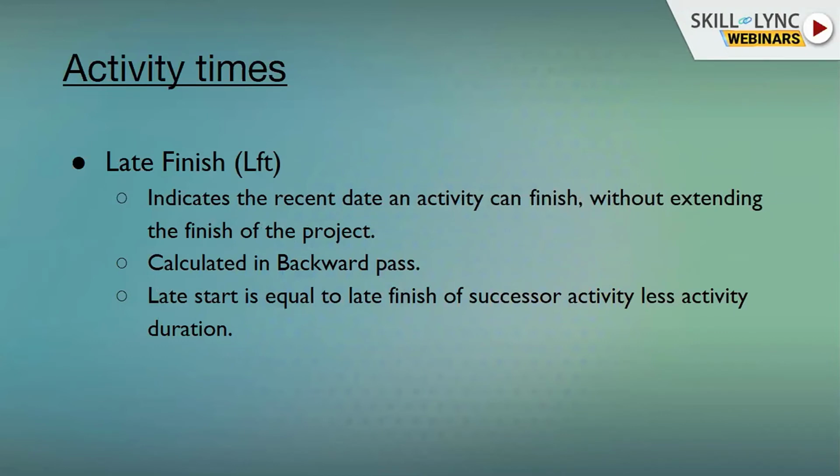Late finish indicates the latest date an activity can finish without extending the finish of the project. It is also calculated in the backward pass. Late start. Okay.